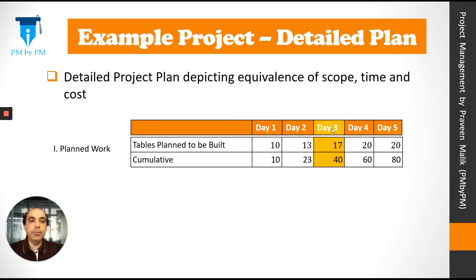This is the detailed plan of our example project. It depicts the equivalence between scope, time, and cost. Let's consider day 3 as our control date. On day 3, we had planned to build 17 tables on that day, and a total of 40 tables by the end of day 3.